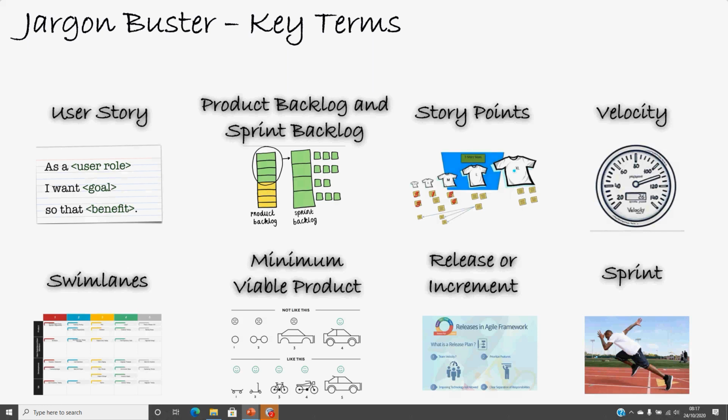So these are the things, you know, by story points we try to quantify the complexity of the user stories, which help us in planning our sprint. Then we have something called velocity. So velocity is actually the speed of execution. So the number of story points that you deliver over a particular sprint is called your velocity in Agile.